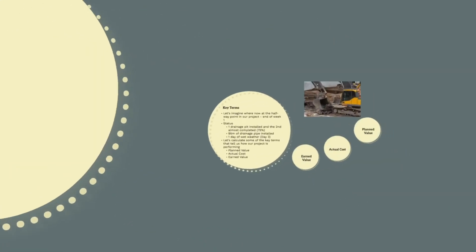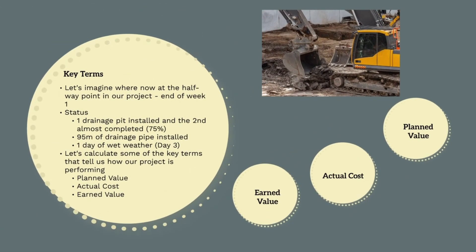Let's now imagine we're halfway through our project, so we're now at the end of week 1 and we want to try and work out whether the project is going well or whether the project is going badly. At the end of week 1, we've installed 1 drainage pit and the second one is 75% complete. We've installed 95m of drainage pipe and we had 1 day of wet weather. Let's now look at calculating some objective measurements that tell us how the project is performing.